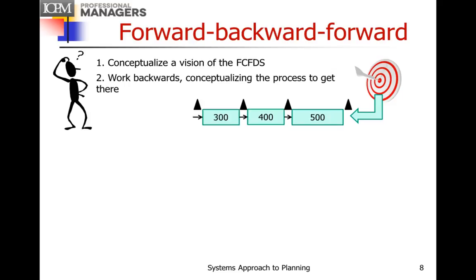And before the 400 level, you've got the 300 level, the 200 level, and the 100 level tasks. Now, in very large projects, major systems acquisitions, those may be formal milestones like system requirements review, preliminary design review, critical design review. On less complex and simpler projects, they may be informal milestones.